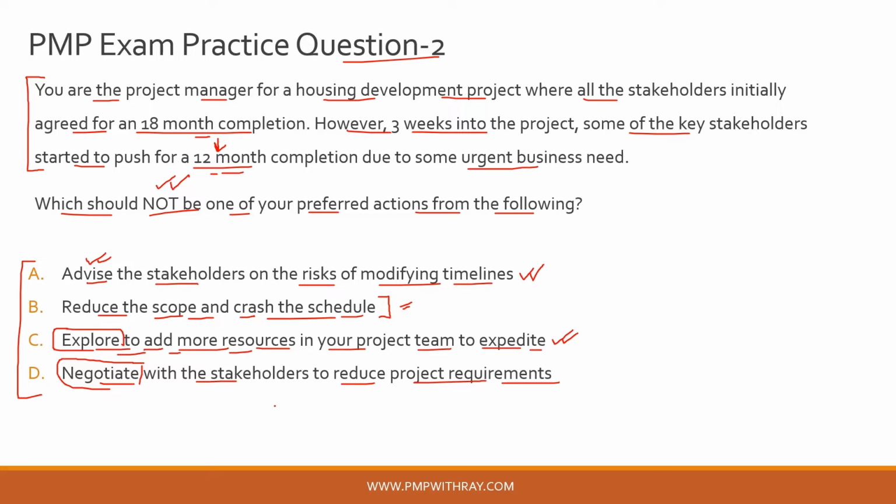Now your stakeholders might surprise you and come back and say, look, we are completely okay to give us these 12 or 15 scope items on the 12-month timeline and deliver the rest, let's say 15 or 10 scope items which are add-ons or good to have, over the next 6 months. So that's how you have negotiated and prioritized. Very important.